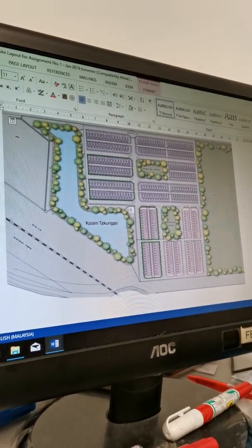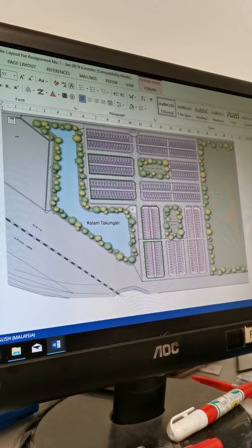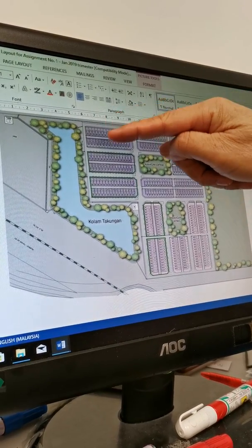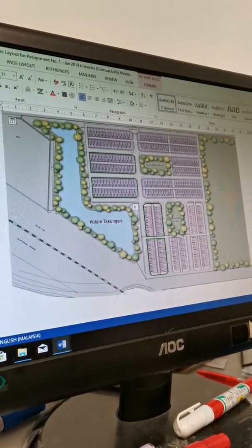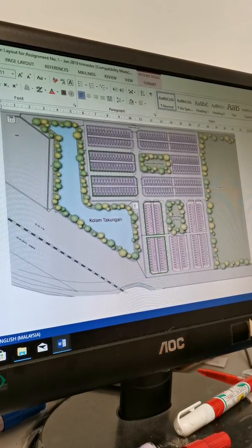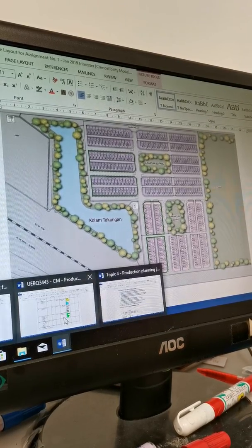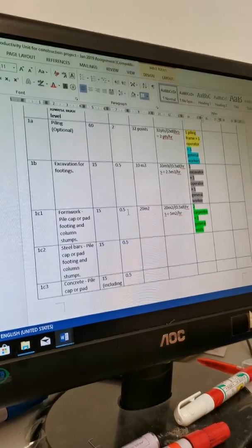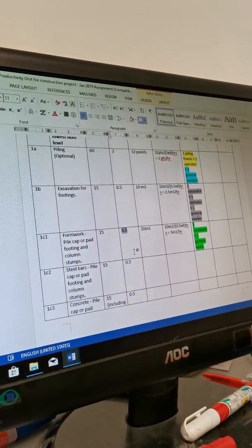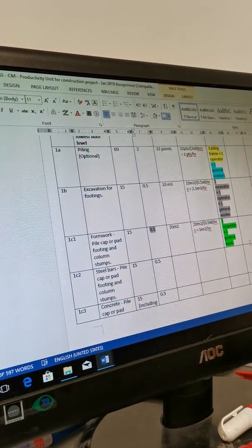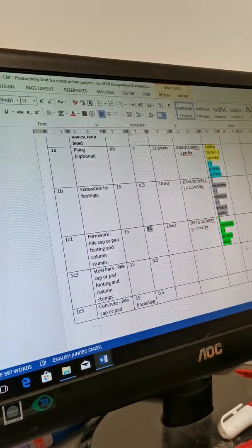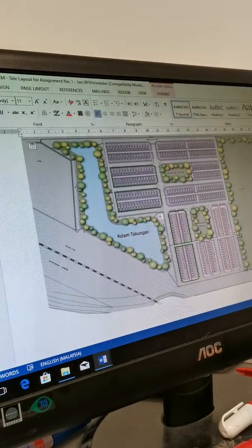Let's say your concrete mixing plant. You will have either one here for each of them, and so on. That's why you have to use a little bit of common sense on machine requirement. But manpower definitely, because we are calculating by per unit. Okay, this is per unit to get this thing done. You can see, you get it done within half a day. So you must have this number of people to get it done per unit half a day. You cannot get the things done otherwise. Okay. I hope you are clear on this.